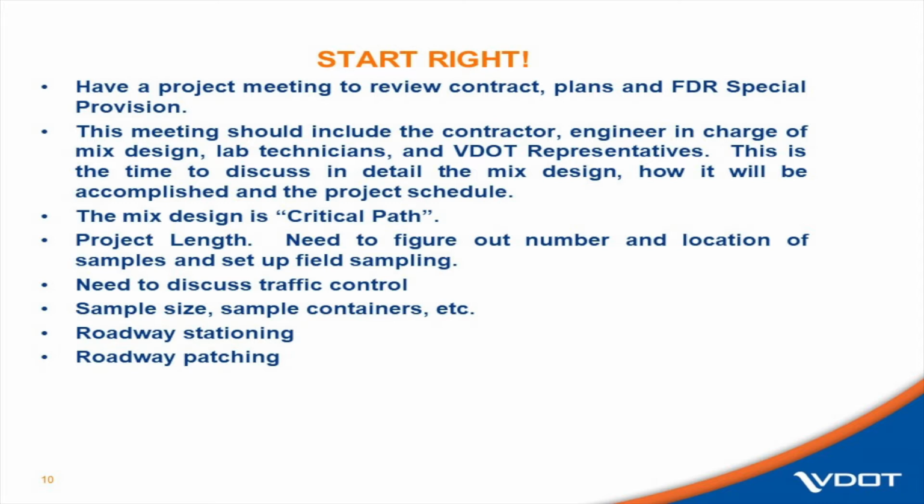Again, the mix design is critical path. Nothing can happen until this is done, so it's got to get done right the first time. There's no mulligans with this mix design. You've got a start date and a fixed completion date. And this is critical path to getting the job going.